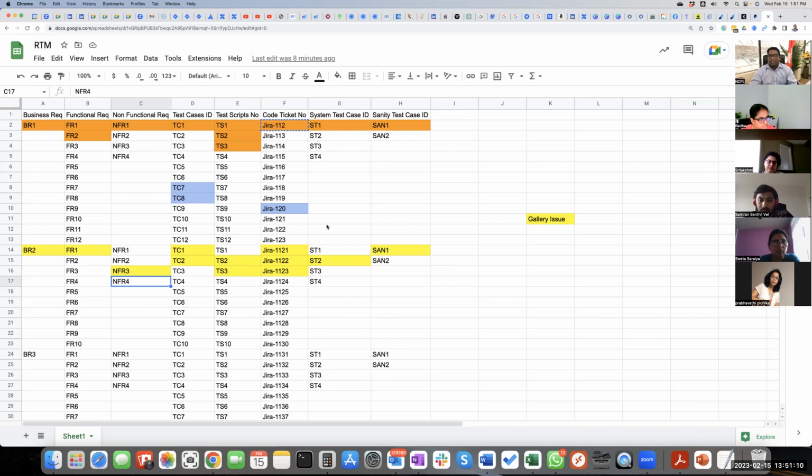As the name suggests, in a requirements traceability matrix, you will be tracing the requirements against the test cases, defects, code, and others if there are any. So that if any issue comes, or if there is any business need, you will be able to easily trace it from left to right or from right to left.